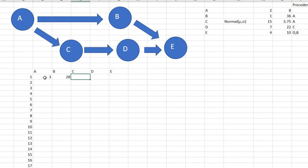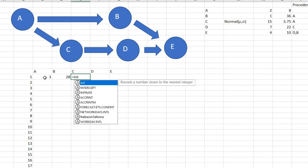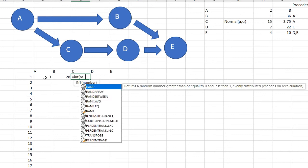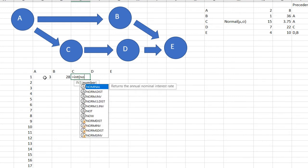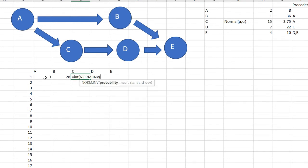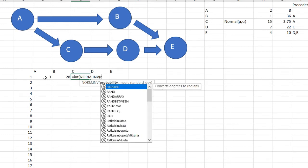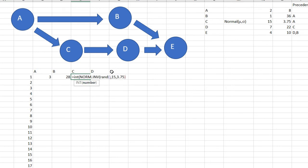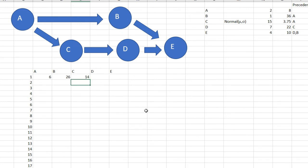Now for C it's a little bit different. I'm going to use the inverse probability and I also want it to be an integer. So I'm going to write INT and then NORM.INV—so it's an inverse probability. The probability is RAND so it's a number between 0 and 1, the mean is 15, standard deviation 3.75. This will generate random numbers with a mean of 15 and standard deviation 3.75, and I will cancel all the decimal points by using integer.